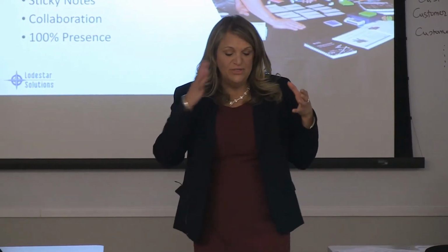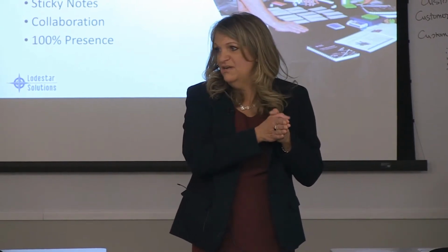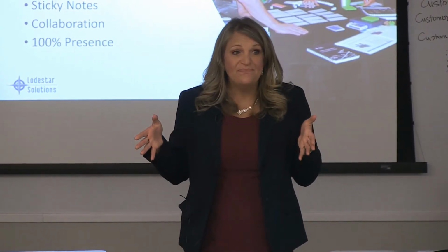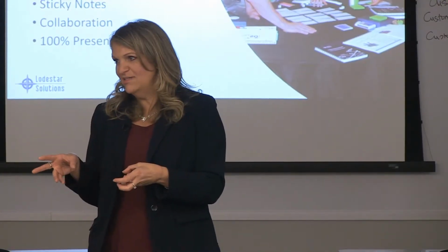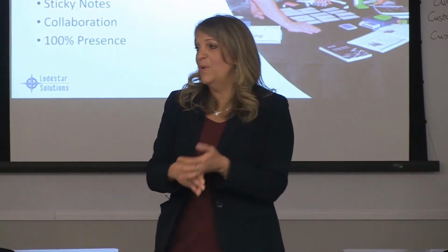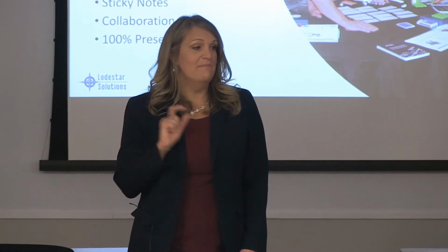And what it does is, one, it teaches you how to do projects with better communication. Typically, it's about a 4-week sprint, 4 to 6 weeks. And what I love about it is, if you take nothing else from understanding Scrum and Agile, take the fact that you do daily stand-up calls. So let's say you're running a project and you do a quick call and they say, what did I do yesterday? What am I working on today? And what are my hurdles? If you just implement that in your teams, you'll be amazed what happens.